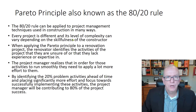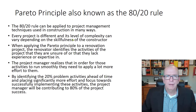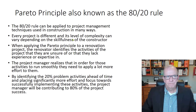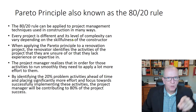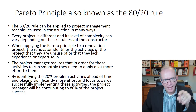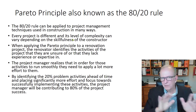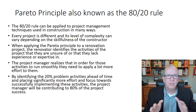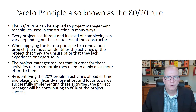My dad, who was a contractor for many years, didn't know about 20-80 or the Pareto Principle, but he did it intuitively. Every project, he would focus on the structural steel — 'got to get that structural steel right' — and put a lot of effort into planning and executing on it. The other 80% was in his wheelhouse: not a problem. But that 20% he had to figure out and manage really well, and that is the essence of putting focused attention where it matters.